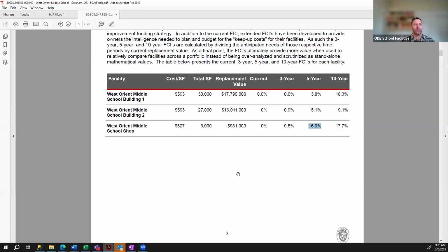So that came from the contractor. And in the previous slide, they use different methods for gathering that. So we'll get into that later on in this report too. There's a section that talks about costs and how they calculate that, but they're using RS Means. They're using regional construction costs. They have two firms that they've worked with, that's what the firms do. They calculate construction costs and things like that to come up with it.